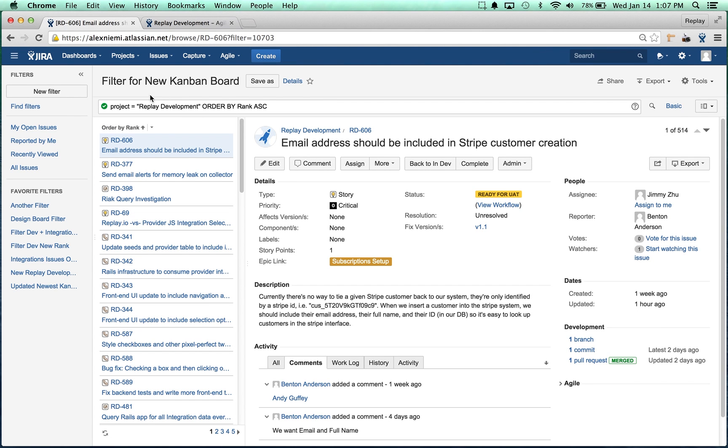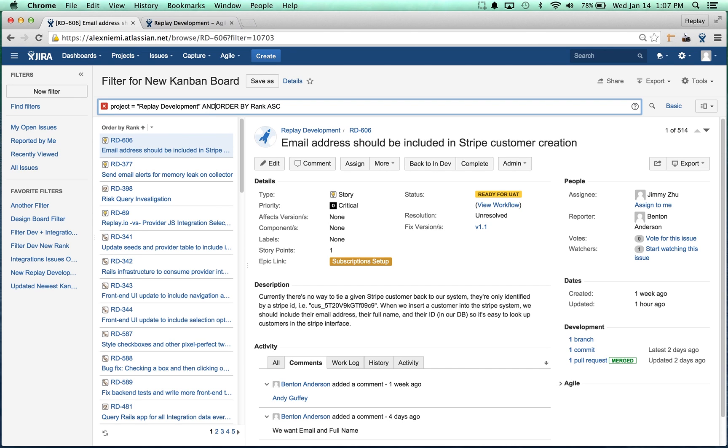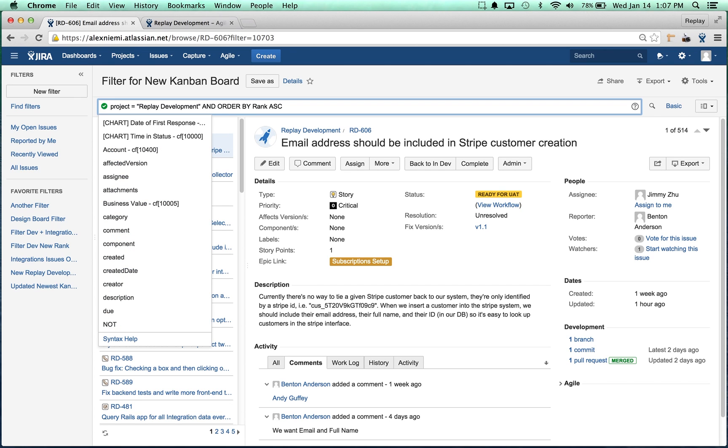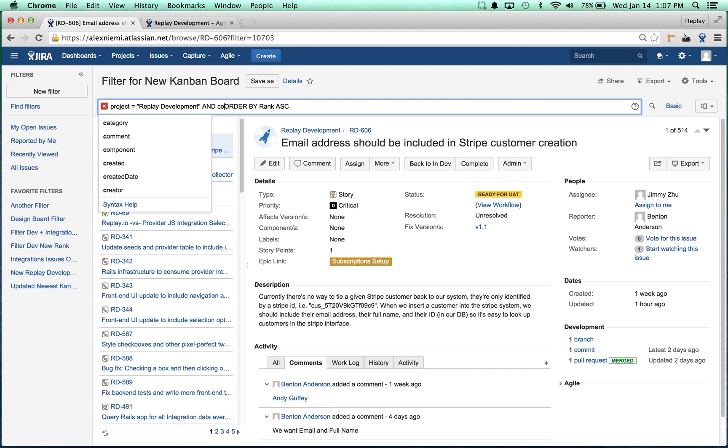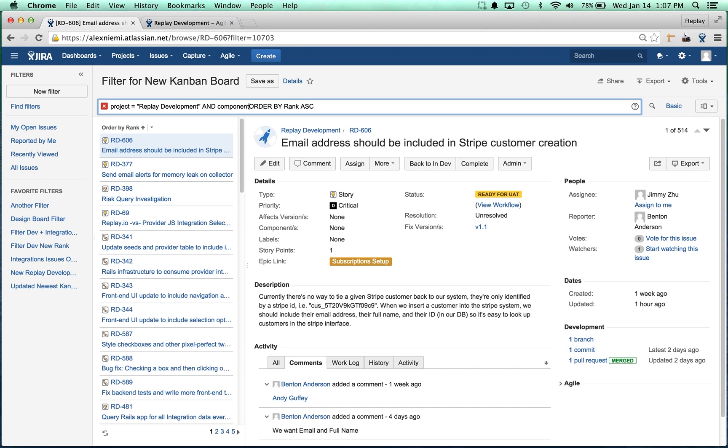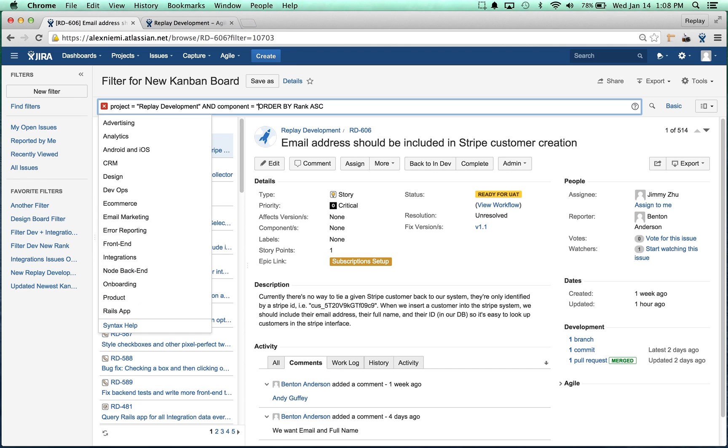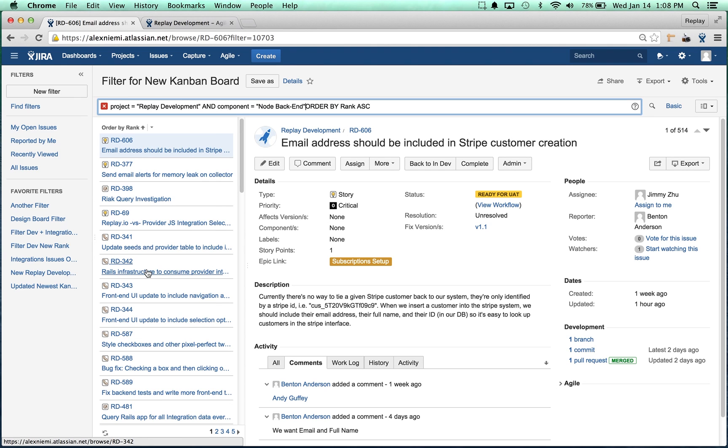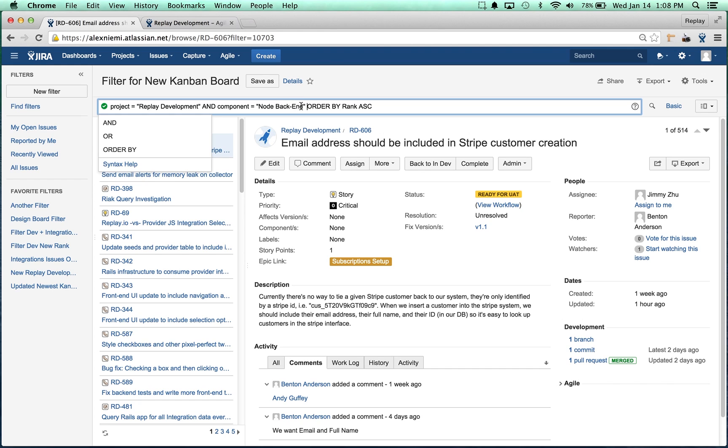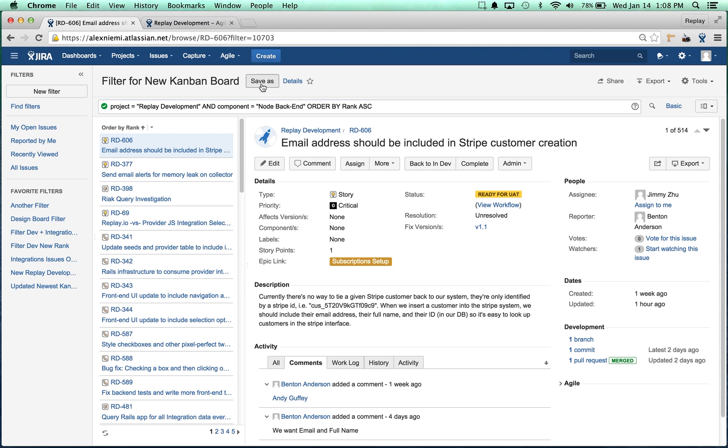Essentially it's just grabbing all of the issues that are in the Replay Development project. We're going to add something here. We can type in component, and the Jira query language is kind of nice because it helps you out a lot. We're going to do everything that has the component of node/backend attached to it.